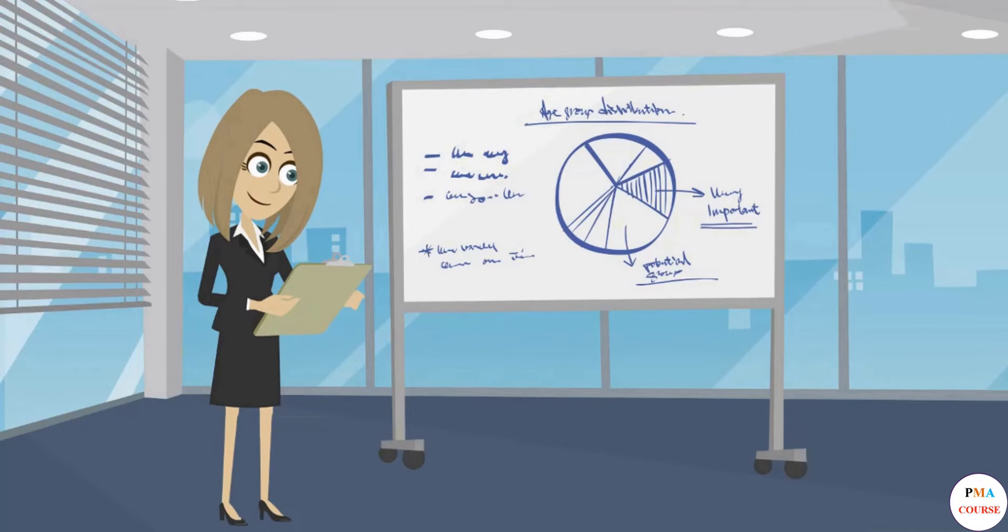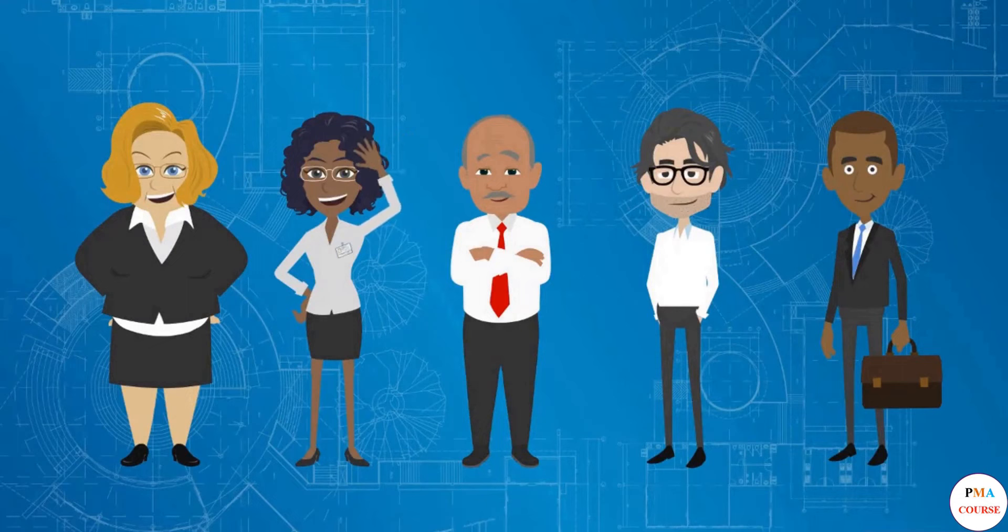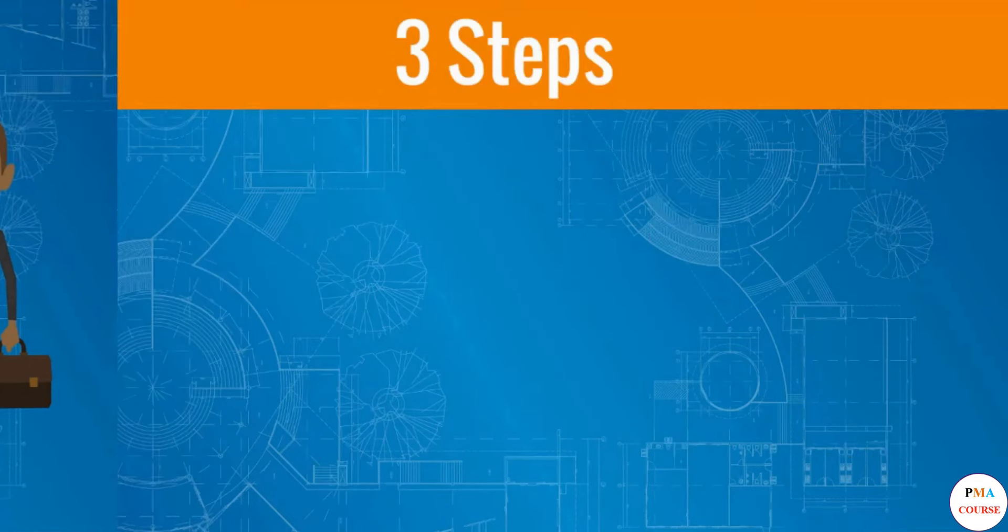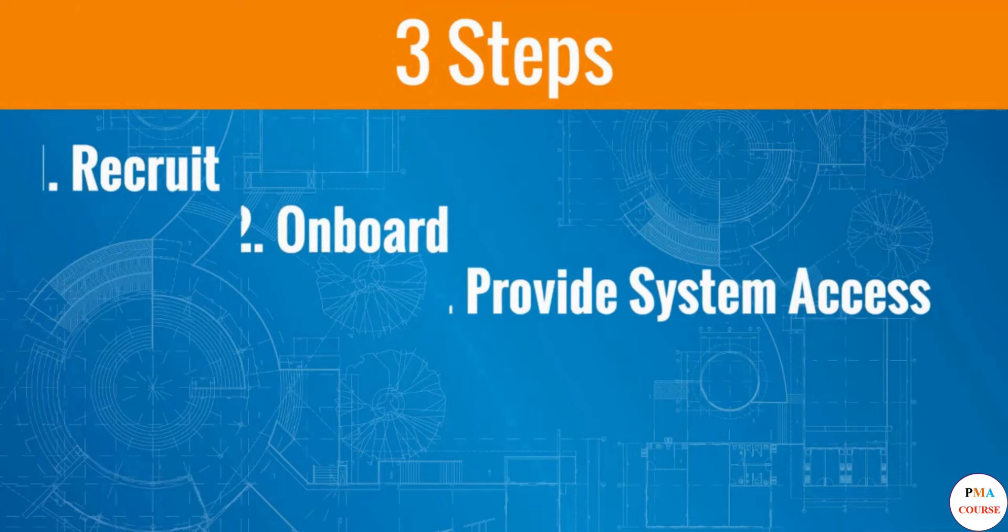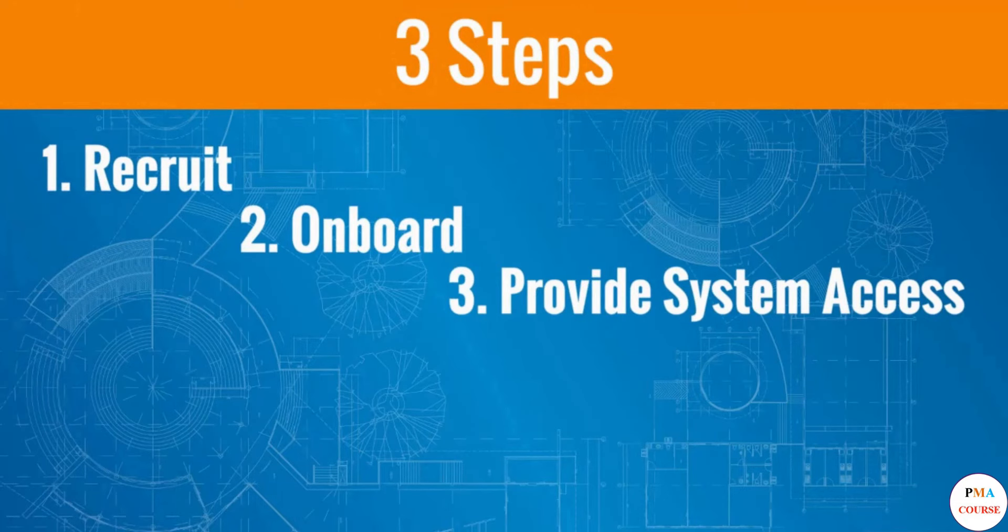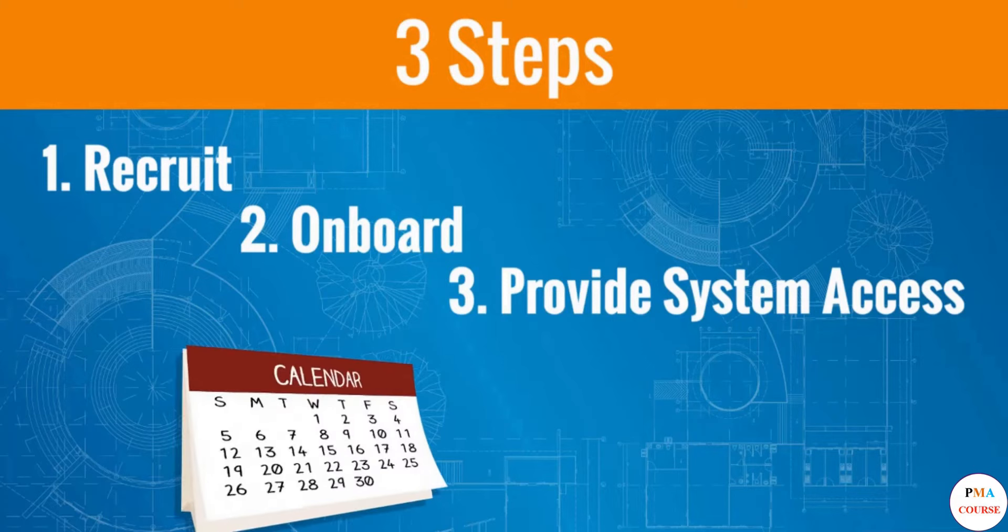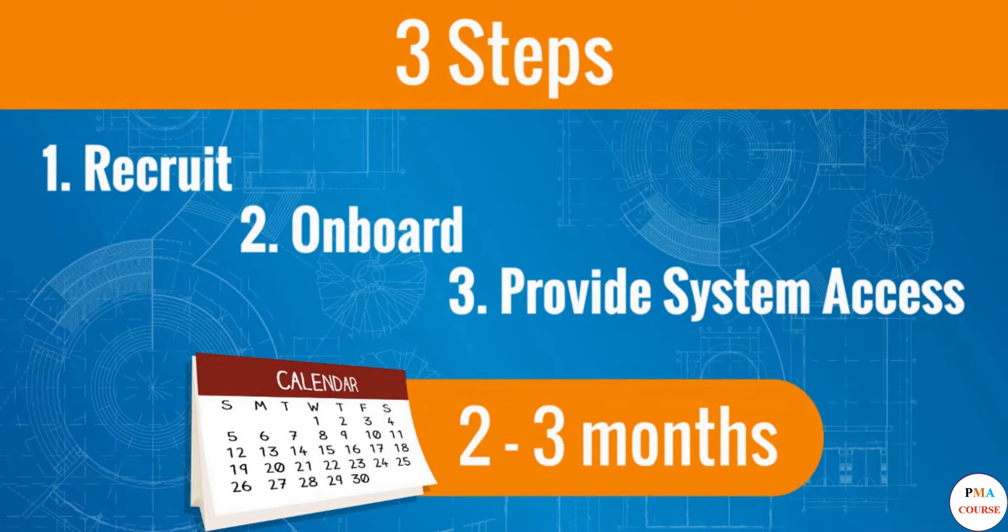Five new employees need to be recruited, then onboarded to the company, and finally provided with access to an important corporate system. Hence there will be three steps: recruit, onboard, and provide system access. The whole activity is lengthy as it can take two to three months, and you want to be tracking the progress diligently so whenever one step is ready, the next one starts immediately without wasting any time in between.